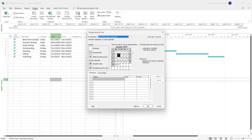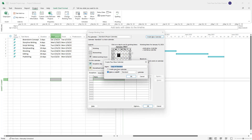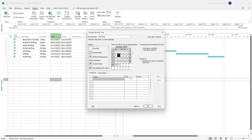If you want to create your own calendar, you can see that Create New Calendar is an option. Let me go ahead and create one, and rename it to, for example, Part Time. You can make a copy of the Standard calendar and make changes to it, or you can base it entirely as a new calendar. I'm going to click on Create New Base Calendar and press OK.